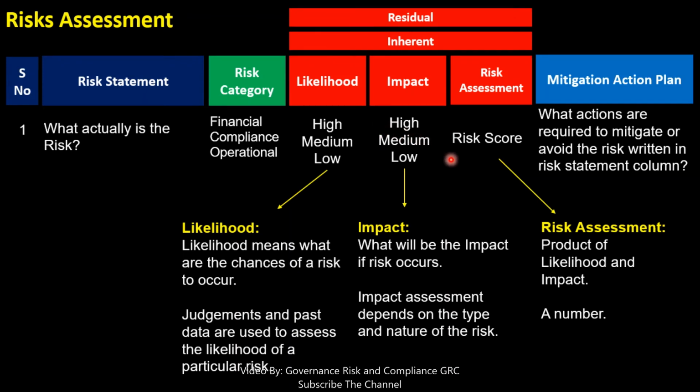Now we know that the product of likelihood and impact is the risk assessment score. So the risk score will be marked here, and the risk assessment will be done depending on the risk score assigned, then